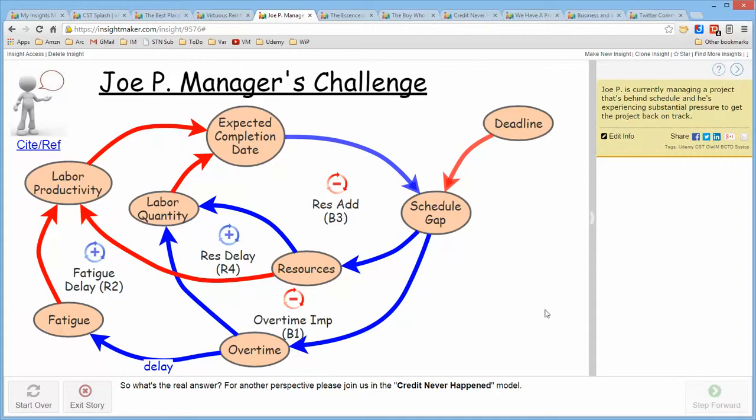And when I consider certain aspects and decide that they're not relevant, I keep a list of not relevant and why they're not relevant. Because if I think about it later, if someone else asks a question, I should be able to say, oh, I considered that and it's not relevant for this reason. And if I take things out of the model because I've decided they're not relevant, I put them in the not relevant list so that it indicates that I had, in fact, actually taken them into consideration and decided they're not relevant.